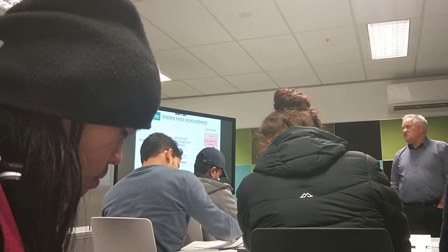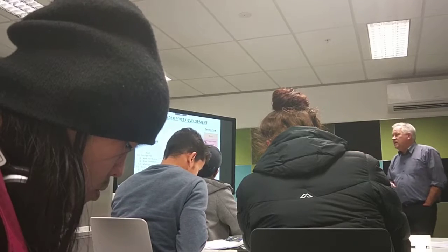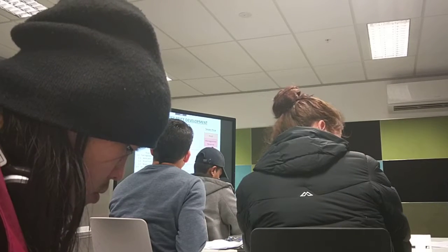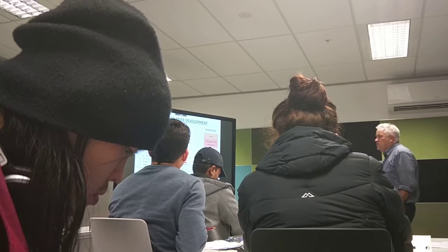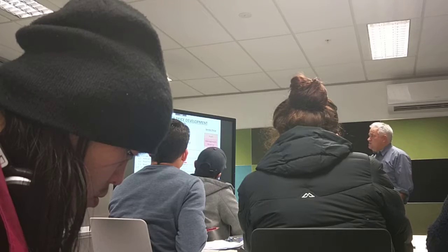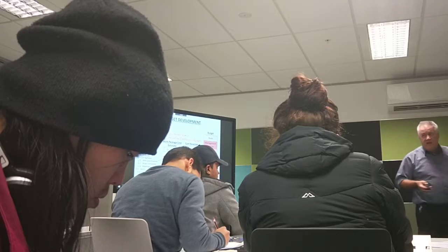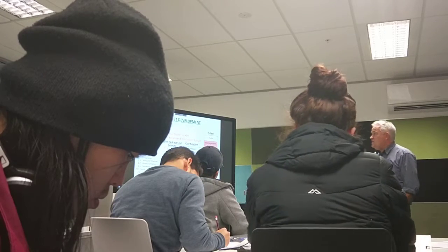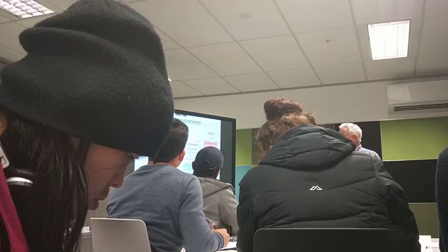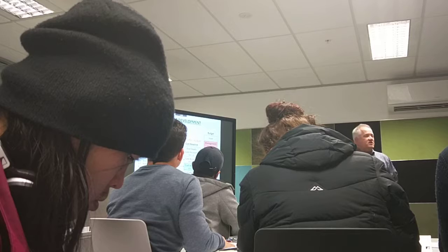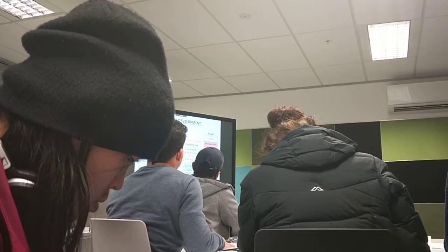So the tender price, the schedule of prices goes into those things. We talked about this when we looked at cost estimates right at the start: when you win it, you take those schedule of prices and turn them into cost centres. You might put some contingencies on it, so you've got the cost baseline. You might put a management reserve on top, which is the contingencies that you don't know about, and then you'll add profit on top of that. If the tender is won, those cost estimates become cost baselines. So instead of managing the project by just one big number, you're managing a whole lot of little projects.